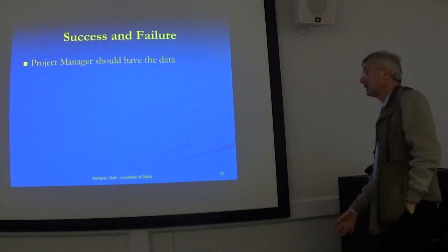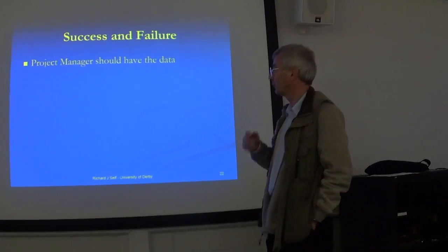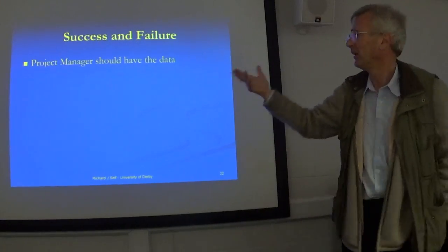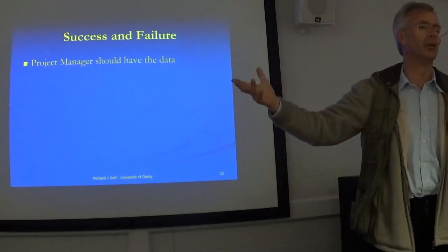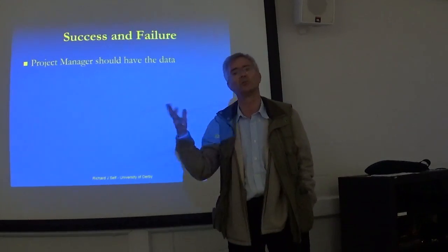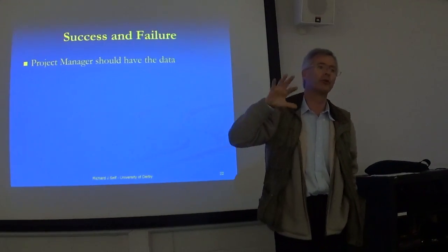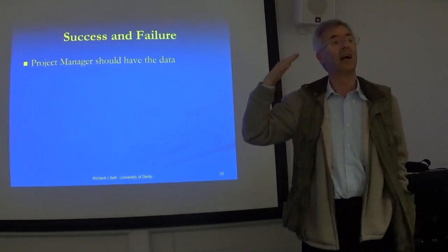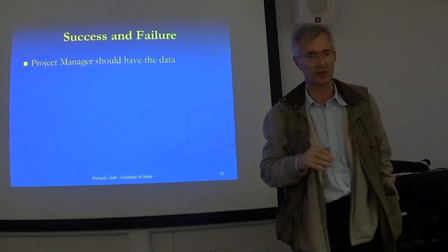Where might you find some of the data? Who might be able to contribute? Success and failure, the Standish Group type factors. Well, your project manager should have all of that lot. They should have access to the costing data, the timescale data, and through the risk register and the testing schedules, find out whether it has met all the functionality questions.